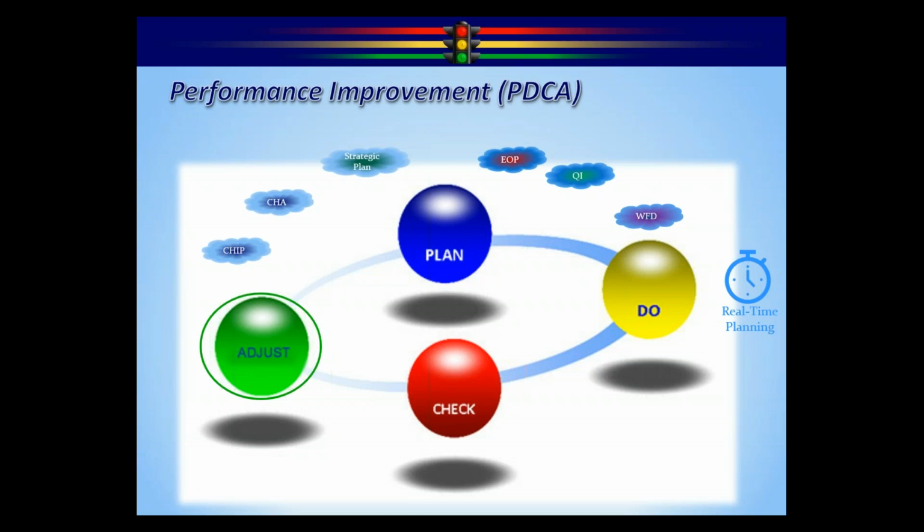If we can, let's adjust the resources to get to the plan. And then the fourth option might be adjusting the plan and the resources. So maybe we just have the resources to build a virtual training, but we can't get to the other tobacco vendors. And we think that might get us to a 23% reduction. So let's take the plan to 23, do the virtual training, and move on through that. So every plan is going through this cycle all the time. This is how we keep the plans live and up to date.